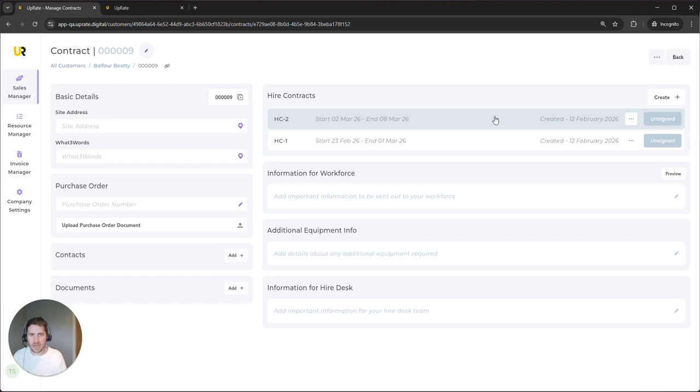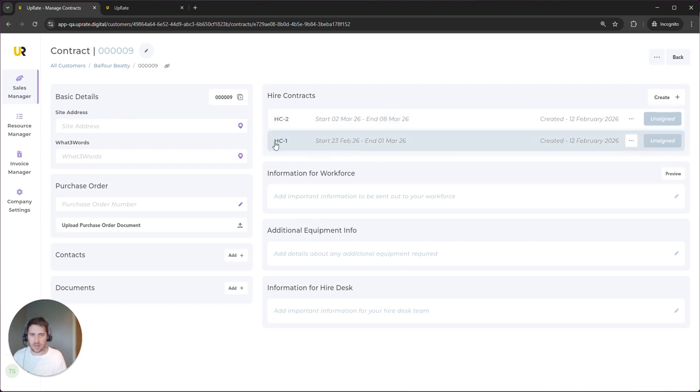You can still also amend. So if I've sent a job out to the customer and I've sent the contract, and actually I don't want a new one, I just want a new version of that one that I've sent, you can click the little three ellipsis buttons here. You've got send, which is obviously sending it to the customer. New version, which will create version, in this case, 1.1. That's the same contract, but a new version of it. Or duplicate, and that's just a shortcut for if I wanted to create a brand new contract, but I wanted to use this one as a template.